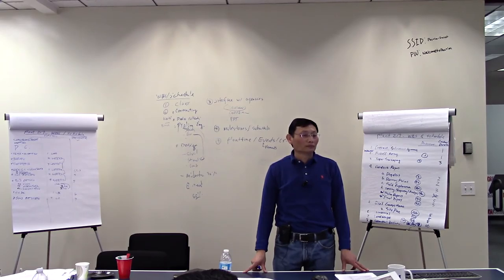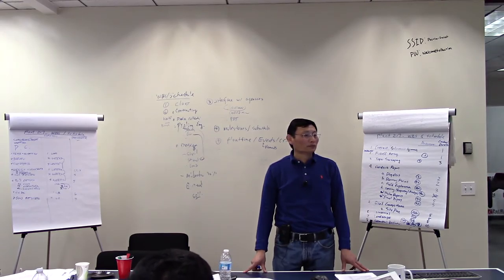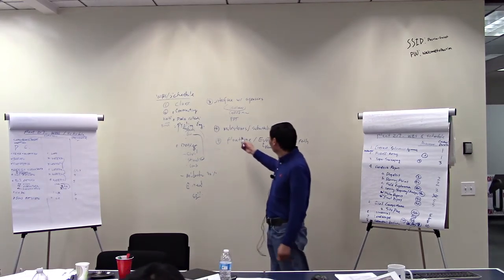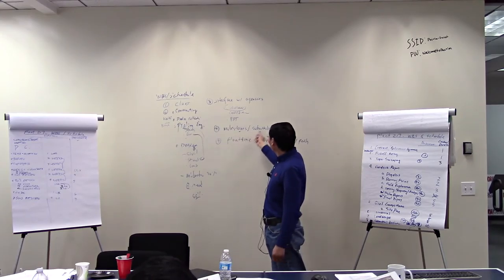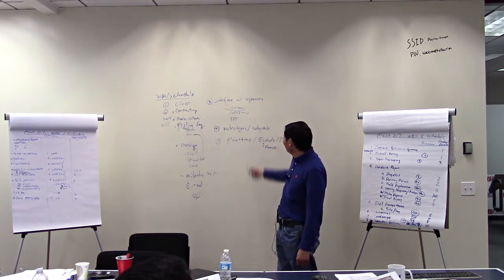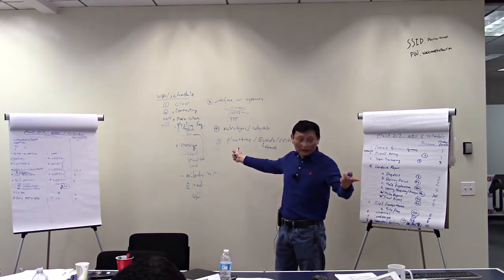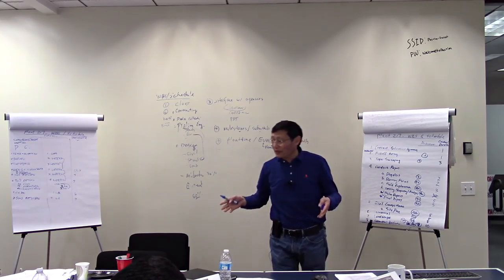So one last quick point. When you run those durations and you link everything like you've done and then you run that out, you may not like your end date, because you're going to go back to your contract and go, wait a minute, I only have 90 days and that's added to 140. So now you start looking at, like one of you said before, we could actually start that task when we have half the information. Like the drainage concept, you could start that right away. You probably have enough record data, and then fine-tune it when you get a topo, stuff like that, where you could pick up time. So that's a common occurrence.